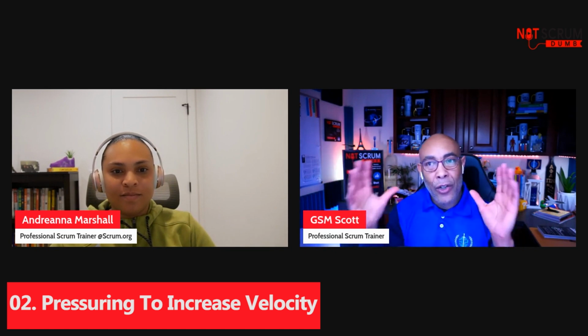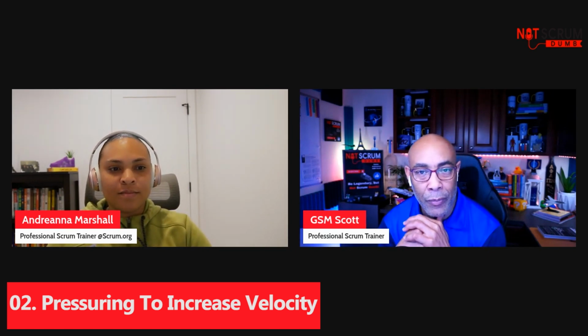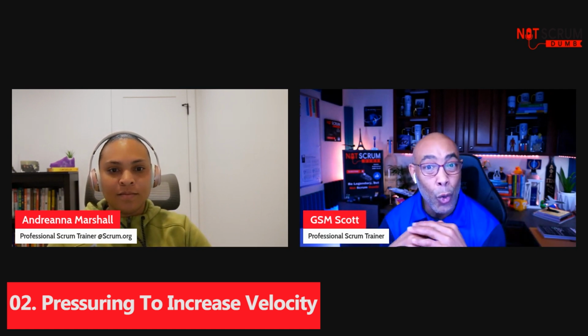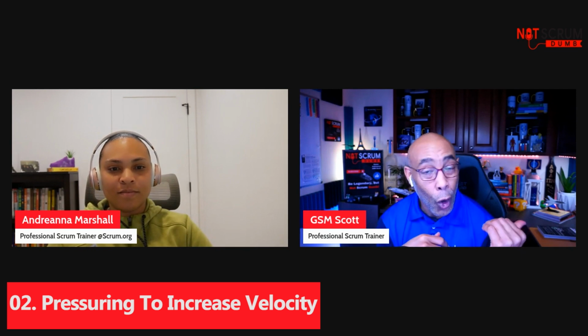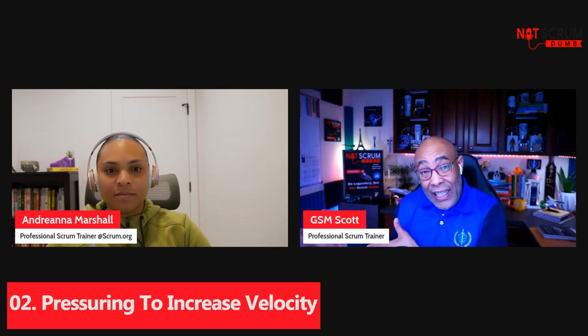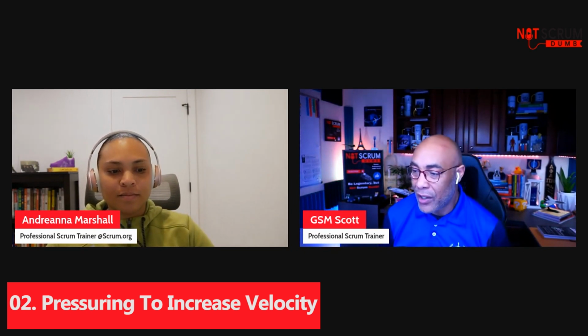I like it. It's okay to give us a guide for sprint planning if you're using this environment. That's great from this standpoint. If you're a Scrum Master, think of it like this. If we in sprint planning and we know their velocity was 50 last sprint, and now all of a sudden in sprint planning they think they can do 100, we should be asking questions like, what makes you think you can do 50 more than you did last sprint? Or it could be the reverse. Why are we only doing 25 when we did 50 last week? So to me, it's a great number just for us to ask questions, not to use as a metric to obtain to. Andriana, your thoughts?